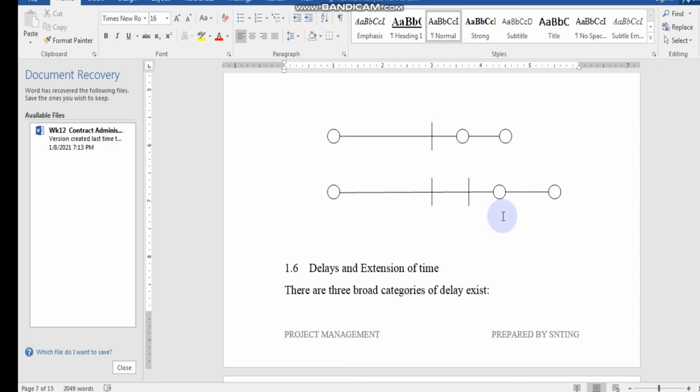So when the authority comes and the work is handed over to the client, that is considered practically complete. Like I said, practical completion basically means the whole project is fit for usage already, with minor issues and minor defects. So you cannot have, like I said, the roof not covered, the road not tar sealed. You cannot have practical completion like that, okay? Or the doors not installed, windows not installed. How can people stay in it? That is a very logical situation.